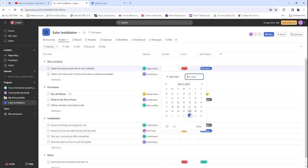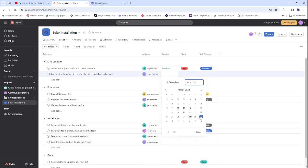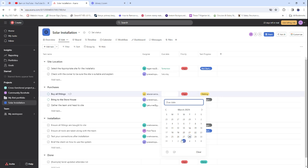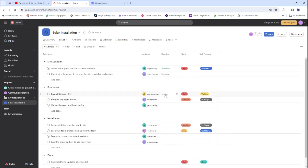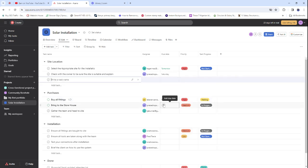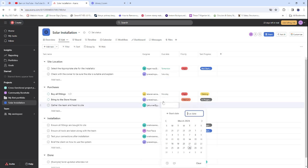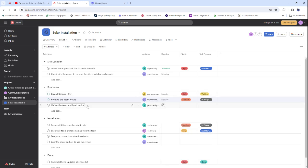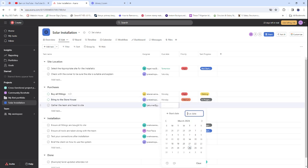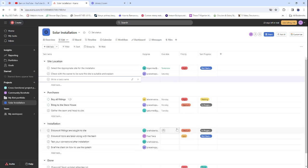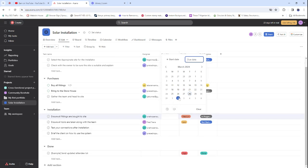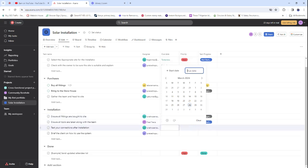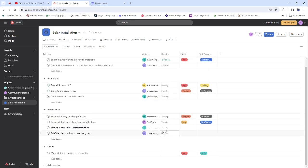Next, we assign due dates. Buying fittings is set for Monday — the first day of April. Bringing everything to the storehouse is also on Monday. Gathering the team and heading to the site is on Tuesday. Installation tasks like ensuring fittings are ready and testing connections are also set for Tuesday, since installation can be done within just a few hours.